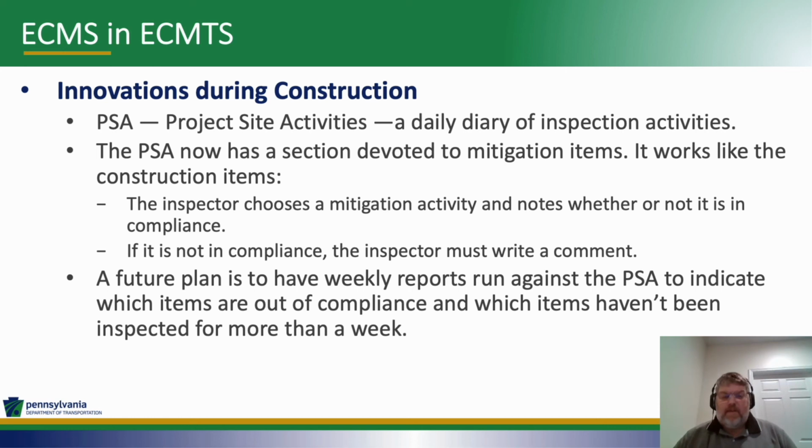A future plan is to have weekly reports run against the PSAs for projects in construction to indicate which items are out of compliance, and another report to show which items have not been inspected. And the idea would be to send those reports automatically to the IIC, but also to the ADE for construction and the environmental manager.